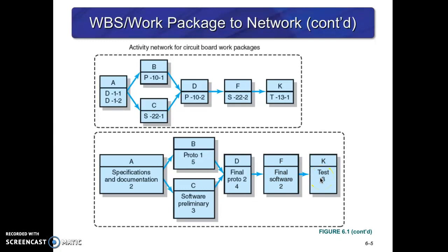Basically it is to put all your work breakdown structure tasks in a network diagram form from left to right with arrows, and that way you can give your project sponsor and other stakeholders a logical relationship of all the tasks you think have to be completed in order to complete your projects.